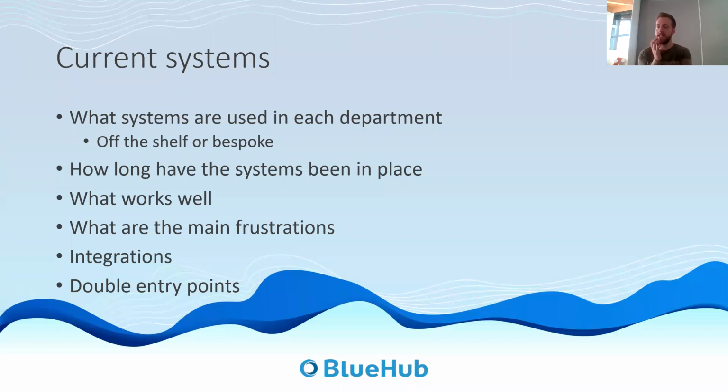The longer a business has had a system, and if that system is bespoke or somewhat bespoke, the more complicated the job will be. The hardest jobs we've ever had have always been removing people from legacy bespoke systems. That's because often the system has been built around their business, automates large functions of their business, and everyone just simply sees that as how a computer works within the company. So if it's been there for 10 plus years, most of the staff just think, well, that's how we do our order processing and it's all automated.